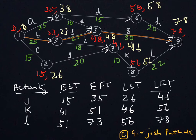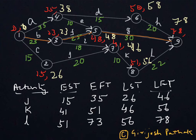When we look at free float, it is somewhat restricted in the sense that the earliest start time of the subsequent activity should not be disturbed. Look at activity K — K starts at node 7 whose earliest time is 41. It means that for free float, J cannot continue beyond 41, because the earliest start time of K should not be disturbed. So activity J can be started earliest at time 15 and can go at the most up to 41, meaning 41 minus 15 gives 26 days available total. Beyond 41 it cannot go, even though the latest time for node 7 is 46.